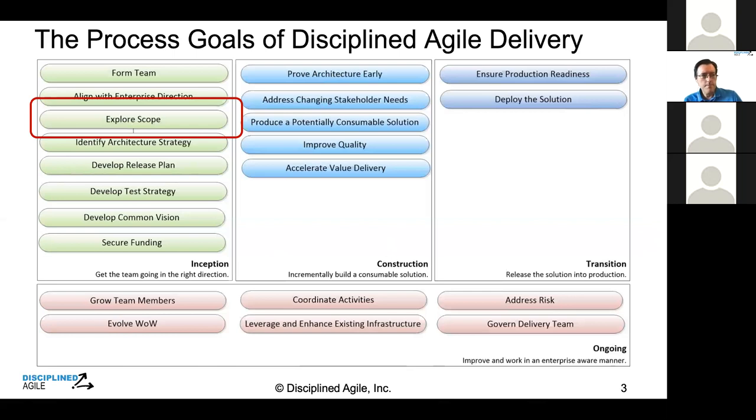But when you take features out, you probably want to think about whether you're taking them out of a release or taking them out of the work item list forever. If it's just a scoping thing, and you can't bring it into this current release, then move it down in the backlog rather than taking it out completely.